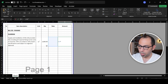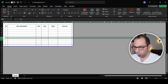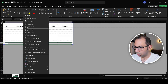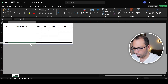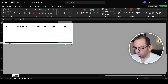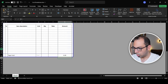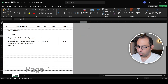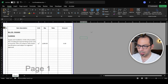The unit of measurement is square meter, and we have 2,000 square meters of porcelain tiles. The amount equals rate multiplied by quantity. Down here will be the page total — the sum of all items on this page. Now I want to go to the estimation area. This is my BOQ; this is the item I want to make rate analysis for.